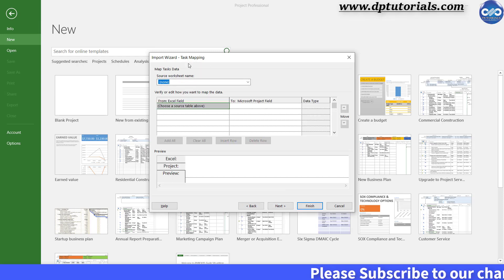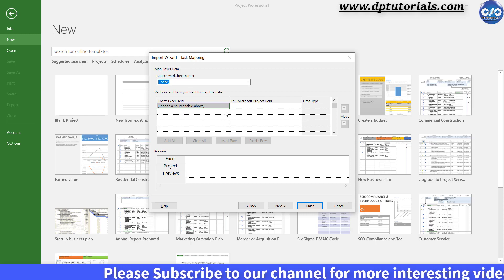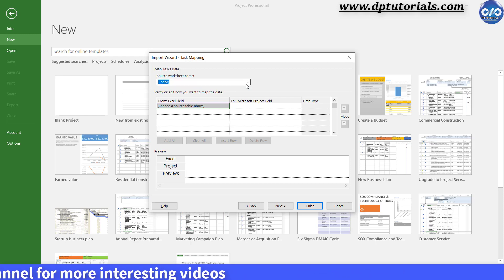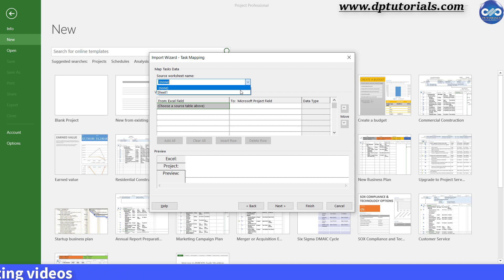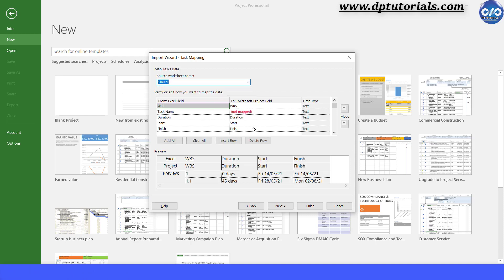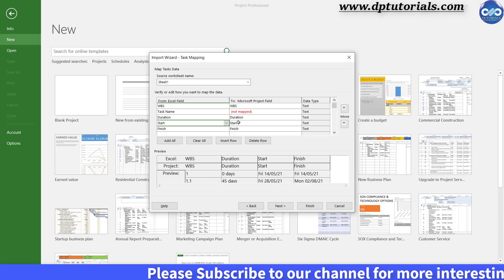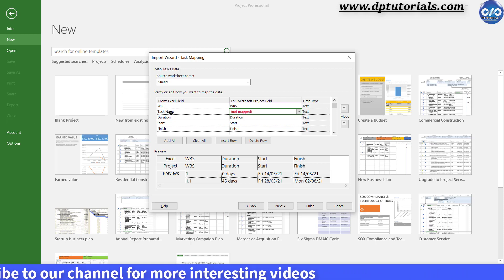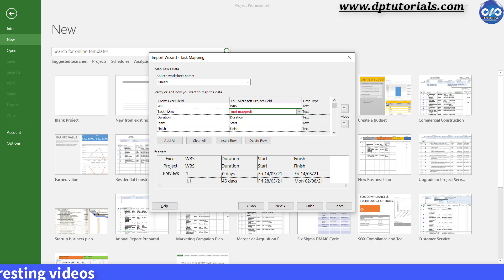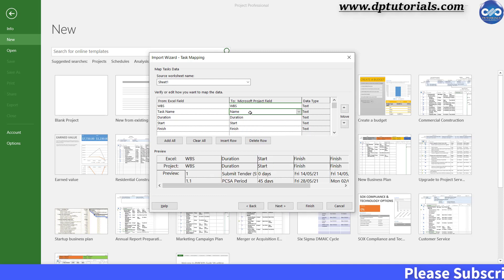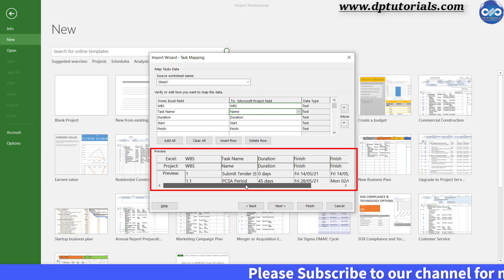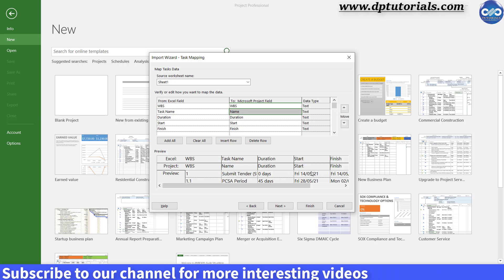In the Task Mapping screen, you tell Microsoft Project how to map the information from the Excel workbook to the project. From the Source Worksheet Name, click on the dropdown and select Sheet 1 where you have the list of activities. You can see the Excel headers in the left column and their mapping with respect to project headers. Project has already detected the right mapping for our Excel headers, except for Task Name, because MS Project does not have a header field called by that name. So we need to manually map it by clicking on the Not Mapped field, clicking the dropdown, and selecting the Name field. In the bottom portion, you can view the preview which shows the exact mapping that will appear in MS Project.